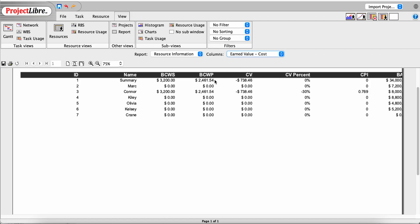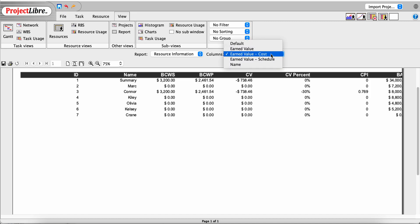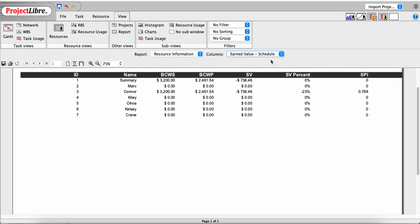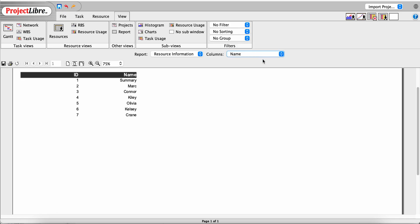We can also select a Cost report, which takes the costing portions of Earned Value. There's also Earned Value Schedule, which focuses on the scheduling portion instead of Budgeted Cost of Work Scheduled. And we can do a Name report — a simple dump of all resources with their ID and name.